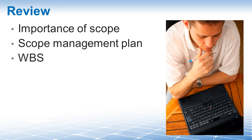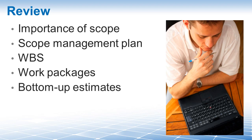Then we have the work breakdown structure, the WBS — one of the most important documents on your project. This is a deliverables-oriented, hierarchically organized list of your project deliverables. It contains things, items, deliverables, results, or products — so it talks about what we deliver, not how we deliver it. And of course it contains 100% of the project's scope. Items at the lowest level of the WBS are called work packages. We will encounter these work packages again in project time management — that is where we will figure out how we will produce them. The WBS is also the basis for making a bottom-up estimate. Later on in the time and cost management chapters, you will learn how the WBS is used to estimate how long each work package will take to complete and how much it will cost.